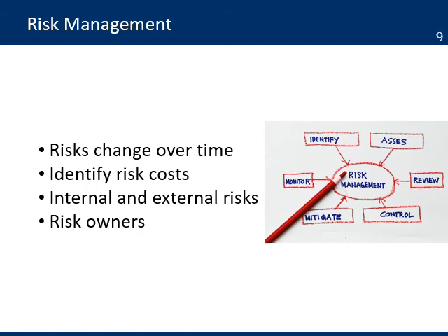Risk owners. Make sure that every risk in your matrix has an owner. You assign the responsibility to team members to manage the strategies to reduce the impact of the risk. They are also responsible for reporting on the progress and the status of the risks.